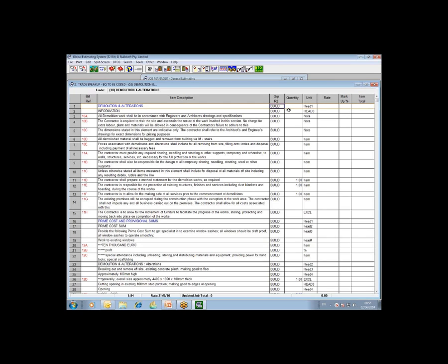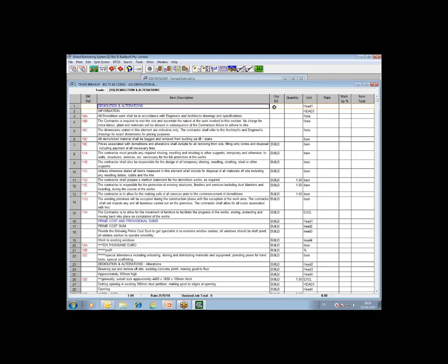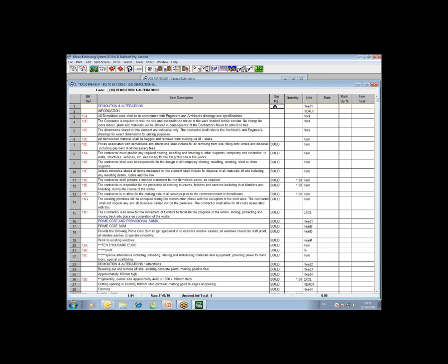But I'm just going to remove the first couple of codes just to show you how, in fact, you would go about resourcing a bill using the codes that you've just established. Well, obviously, you can type the code into the field. Probably not the most efficient way, in that you may inadvertently make a mistake and type in an incorrect code. The most efficient way is to double-click on the or2 code column adjacent to the row that you want to apply the coding to.